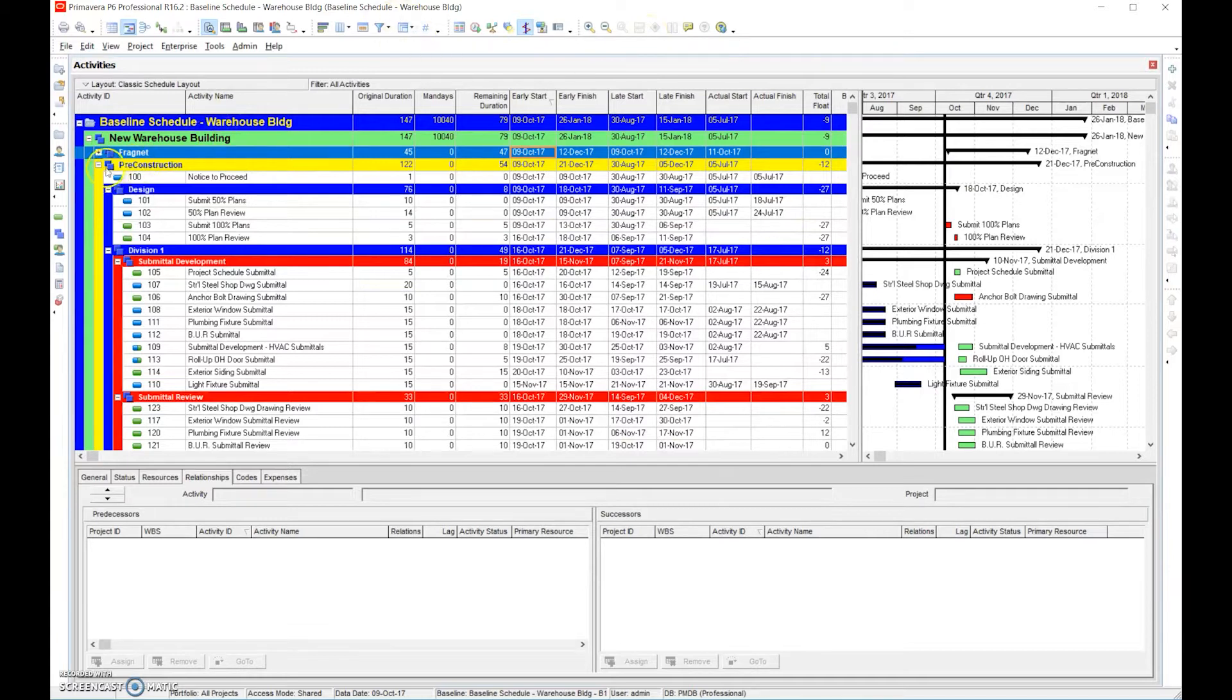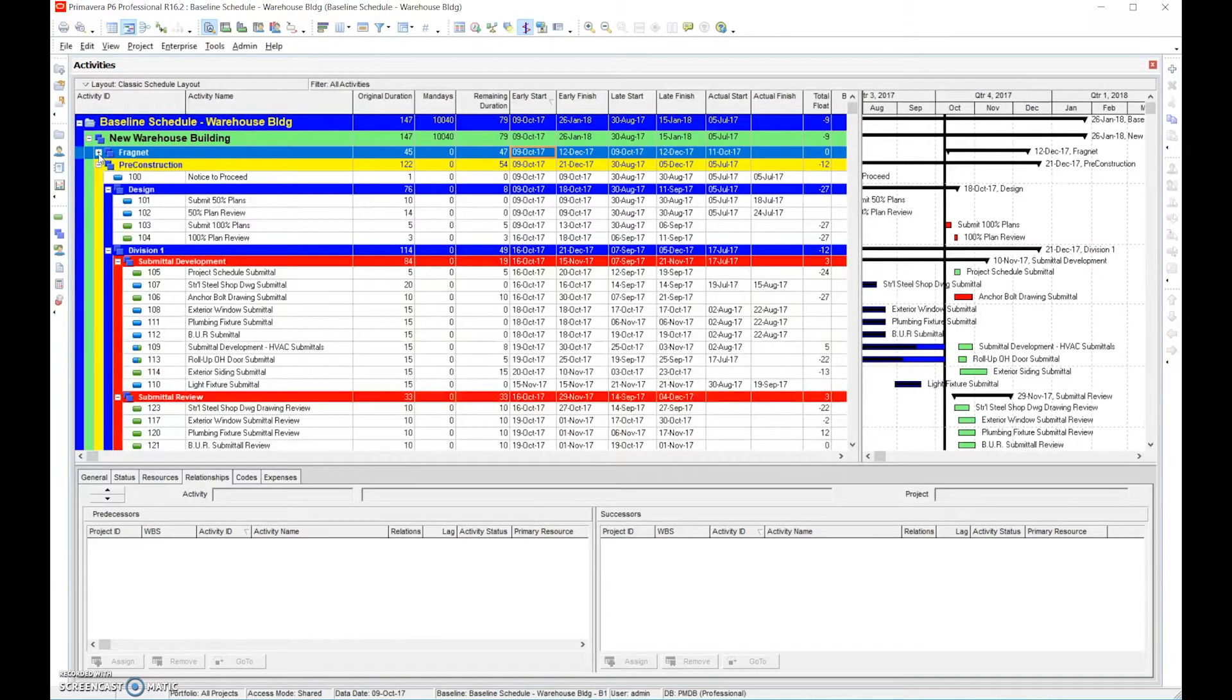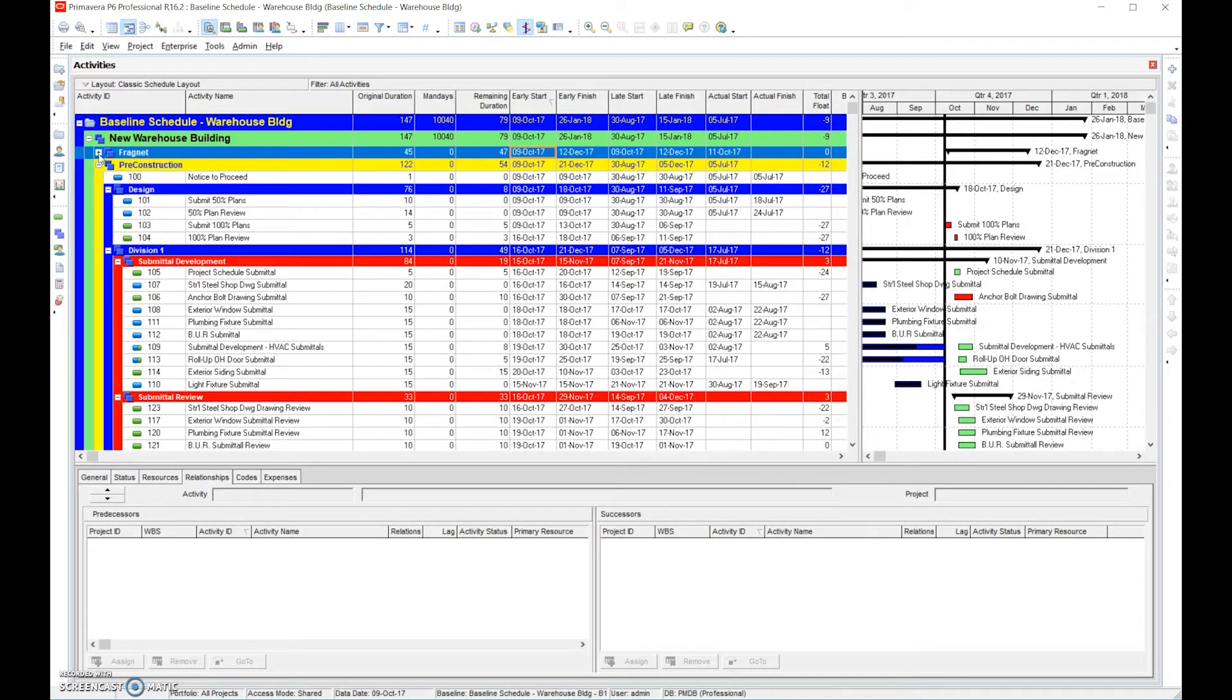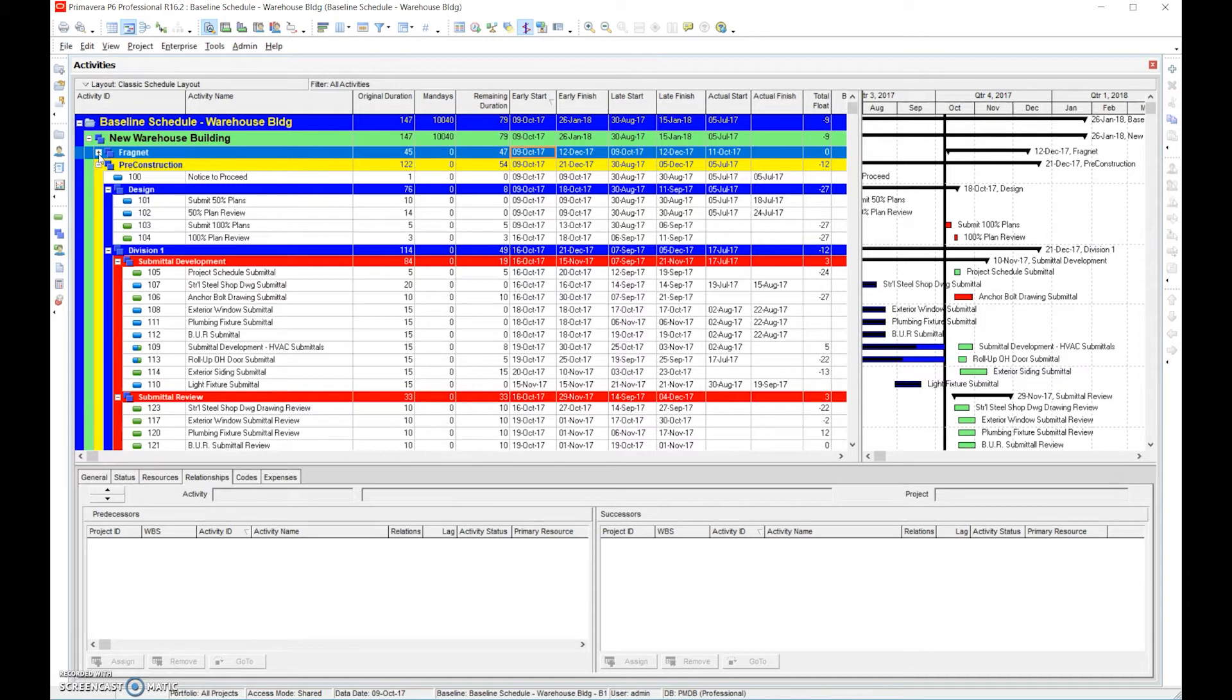We know at this point that when we do a recovery schedule, it's important to understand you only want to do a recovery schedule when you as the contractor are at fault for the delay. So we don't want to recover time because the owner did something or didn't do something. We don't want to recover time if there's changes that occur that are not our fault. We only want to recover time when the blame lies on our shoulders completely.